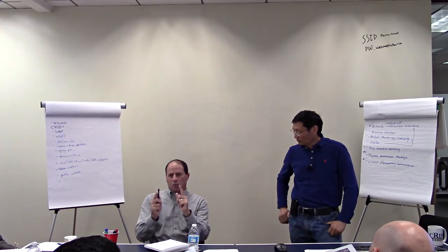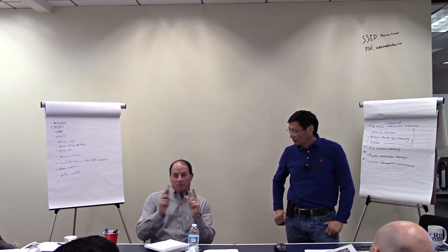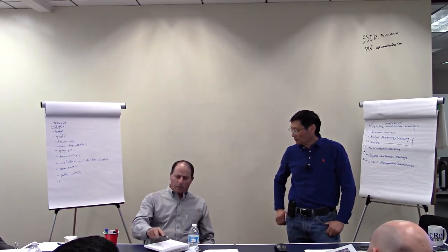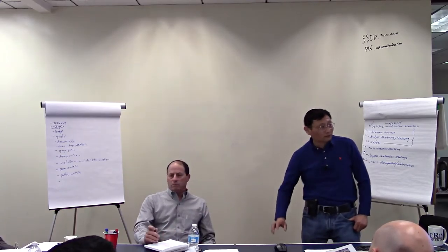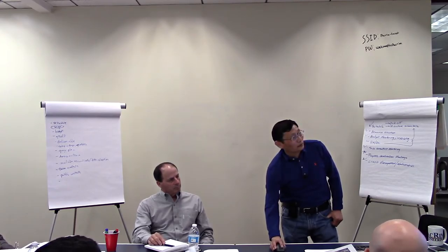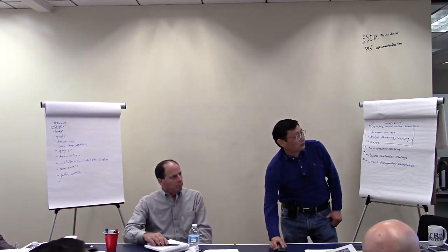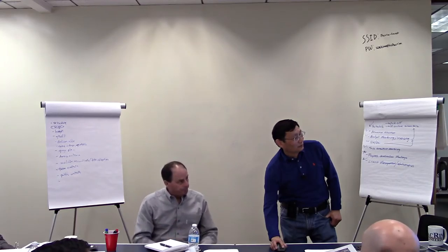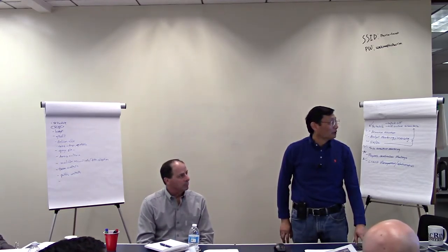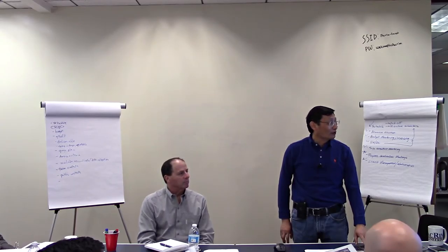The other thing is, remember last time we connected the schedule to cash flow. You could look at it and see when your major tasks were. So even if you did it simply, you could say, I'm going to spend about 20% of my budget here, which then relates as a tool back to that backlog. It helps give you an idea about how you're spending along the way.